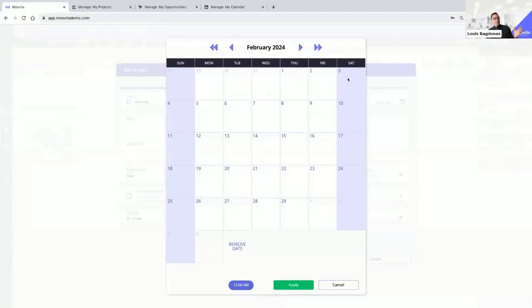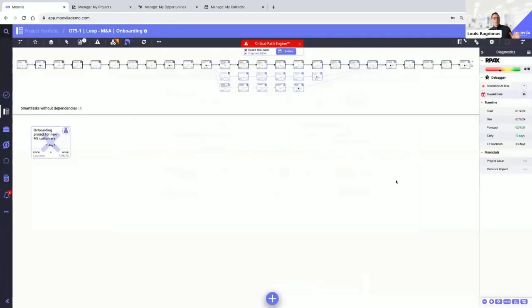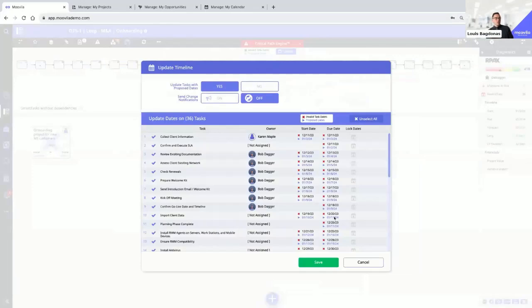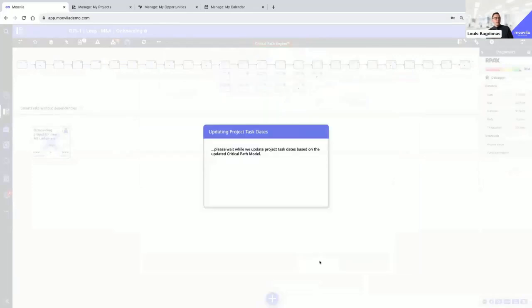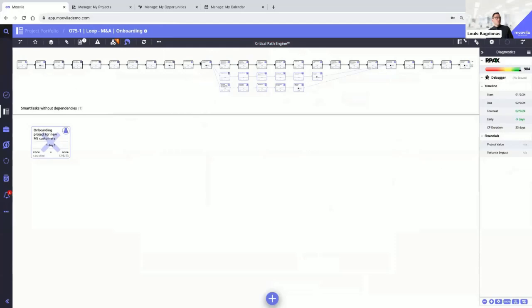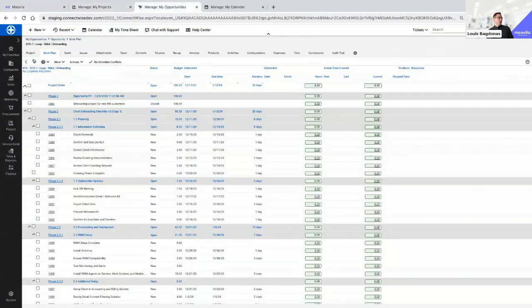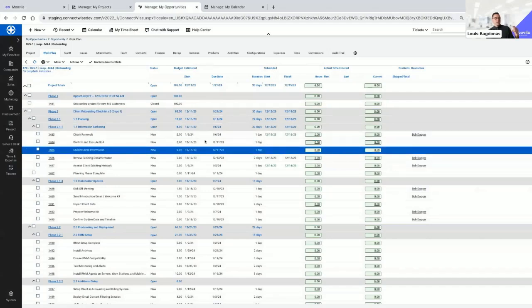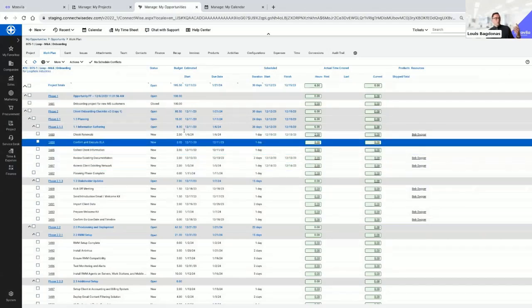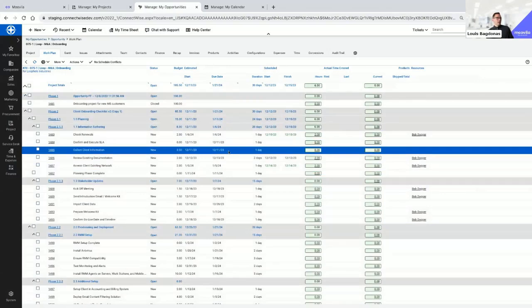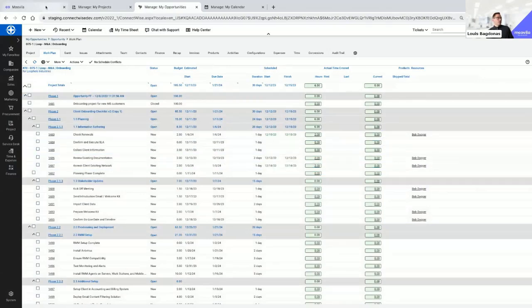Customer's going to say, yep, we understand this is on us, because all customers are understanding like that, right? And we're going to say, okay, 2/3 is a Saturday. Let's say we'll agree to the 9th, give ourselves a little bit of wiggle room. And then again, with just a couple clicks here, I can then update the start and due dates of all these tickets. We want to come back into our PSA. We can see real quick, we're recasting and updating all of those dates on all those tickets here within that